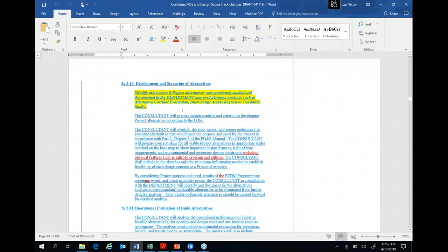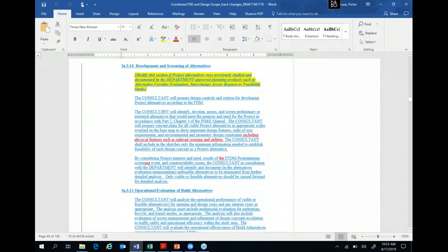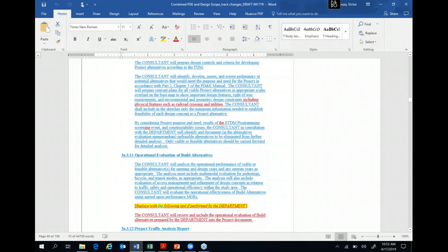Keep in mind that we said earlier that most of the projects following this process will have one build alternative. So when you come to the scope, pretty much you know what you're going to be doing. However, per NEPA regulation, you need to capture alternative analysis, and that alternative analysis could simply be a comparison of a no-build and build alternative. Sometimes you may need to tweak that alignment or make some modification here and there. So this activity will continue to capture the effort associated with that.